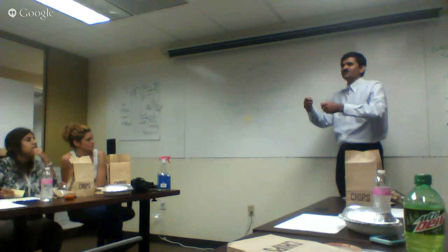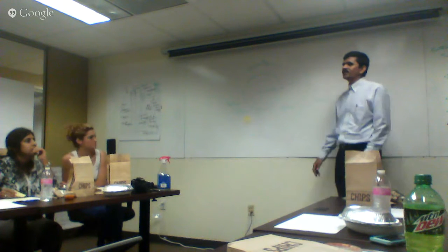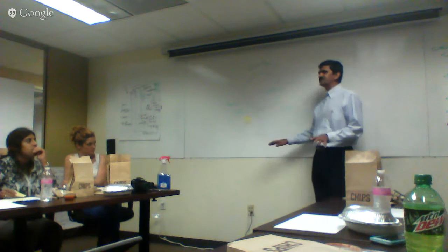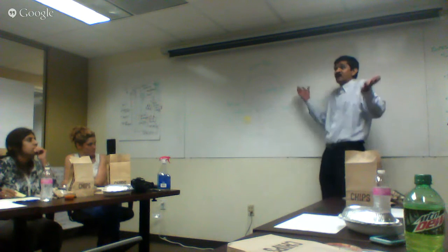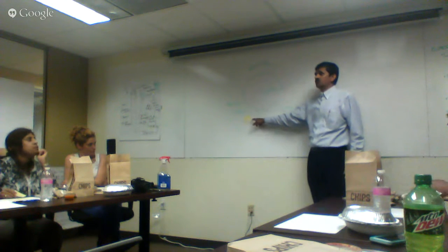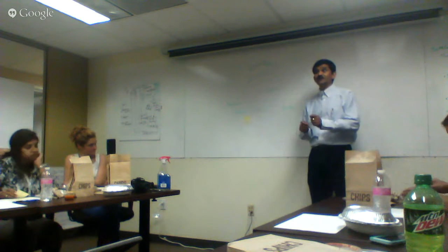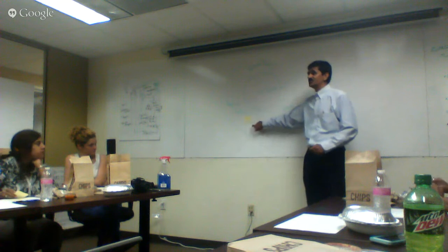But even though those are not possible, because you still have to pave the road in order to work some other requirement, he says, okay, you know what? For one week, I'm going to cancel this week. But this happens very rarely. That's the only authority, for the sake of this discussion, in the hands of the product owner. No one else can cancel this week. Even though team members say, I can't do it, you have to now show that work to the product owner through the Scrum Master. So the product owner's responsibility is to be in contact with the team and Scrum Master all the time, right? We don't want this situation to happen.